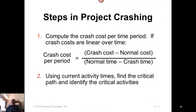The first step in crashing is to compute the crash cost per time period for each activity. The formula is: crash cost minus normal cost divided by the difference in time — that is, normal time minus crash time. This ratio gives us the crash cost per period.